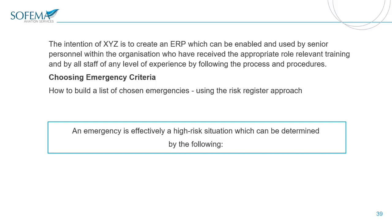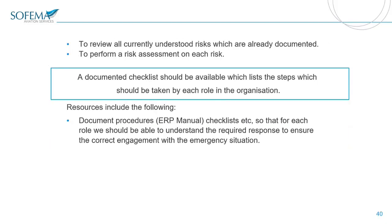The intention of our organization is to create an emergency response plan which can be enabled and used by senior personnel. To build a list of chosen emergencies, use the risk register approach — look at the biggest risks we've identified and connect them to types of emergency scenarios. What happens if there is a medical emergency? What happens if there is another type of emergency within the hangar environment? Review all currently understood risks, perform a risk assessment, and create a documented checklist listing the steps to be taken in each role of the organization.